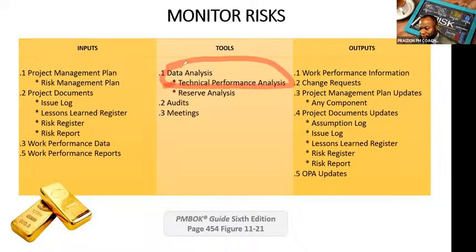That's a schedule risk. Reserve analysis is going to analyze whether you have enough schedule reserves, cost reserves, whatever the reserve is, within your contingencies for those tasks or activities. So for every risk that you identify, if it's affecting a particular schedule objective, you need to have enough reserves in there. Risk audits: you want to periodically assess how well your risk response strategy is going. If your risk response strategy isn't working, that should be uncovered in a risk audit.